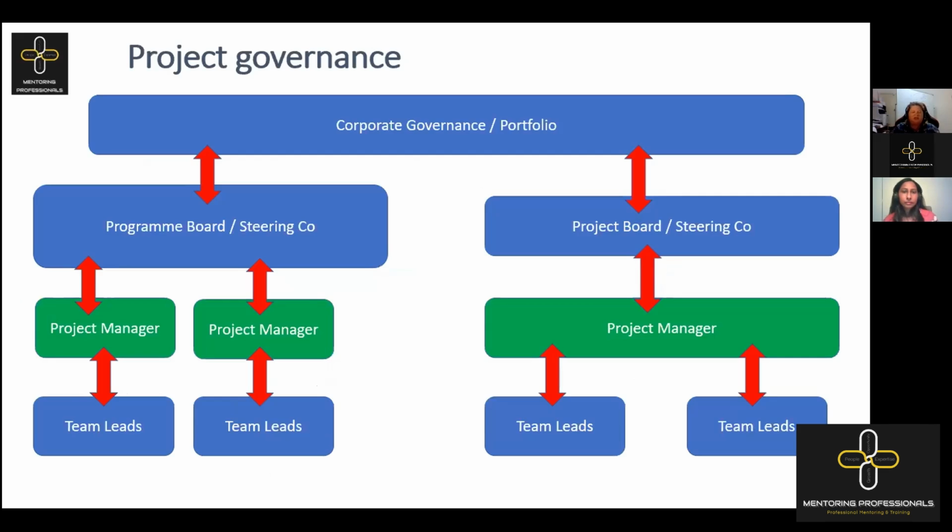When we're looking at the project level upwards, then we need to actually incorporate that corporate governance into the way that we work. So if I have my program manager hat on, I can actually call somebody from the audit team to come and audit my projects within my program. And that is not looking at the work being done specifically, it's actually looking at how the project manager is in fact managing those projects. Are they in line with our corporate processes, for example? We're making sure as a result that our projects and therefore our programs are being managed effectively.